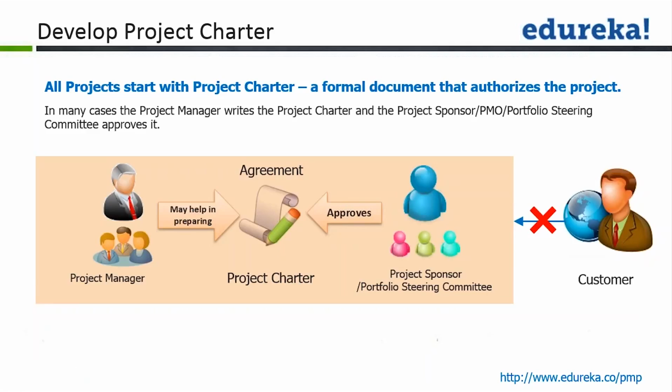In case of an internal project, again, it all depends on the way you work, the way the different entities of one single organization interact with each other. That is all subjective. But in case of an external customer, you must never ever share this charter, because this charter contains your business objective, why you're doing this project, and that sometimes can be highly confidential, which you must not share with the customer.